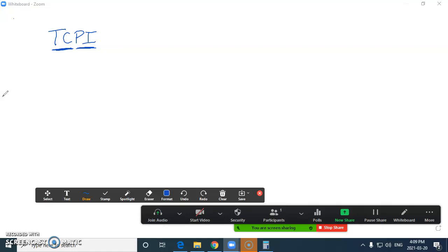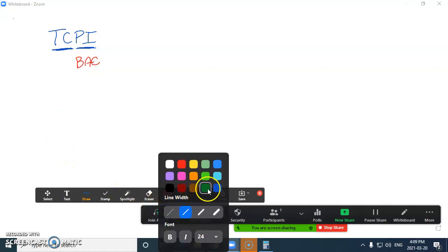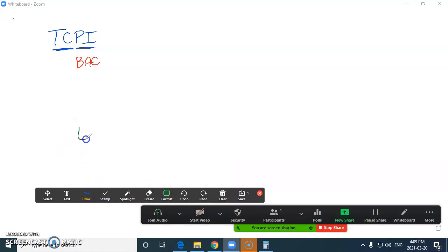specific parameters. Now, the two parameters that we've calculated with regards to the end of the project are BAC, which we didn't calculate, but we've got BAC, okay? And then the other one that we've got is EAC, which is an estimate based on where we are right now. So we can have a TCPI, a performance index, in relation to getting to BAC, and one in relation to getting to EAC. So let's do the BAC one first.